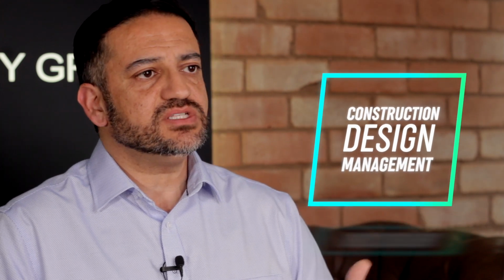The next thing you want to clarify is the CDM. CDM is Construction Design Management, which deals with the aspects of health and safety on site. Ideally, you want your building contractor to take on that responsibility, what they call the principal contractor, so they have the responsibility for health and safety on site. The 2015 regulations made it much clearer who is responsible for what, so it's important that these things are discussed and clarified.